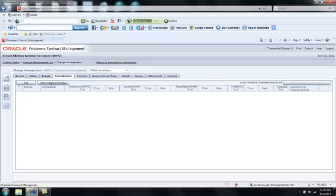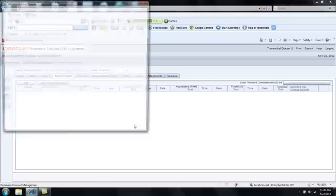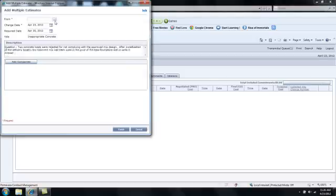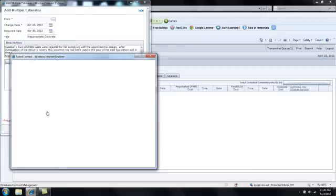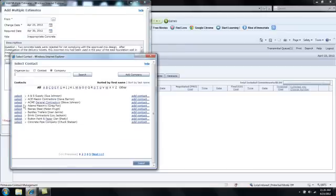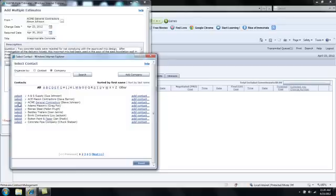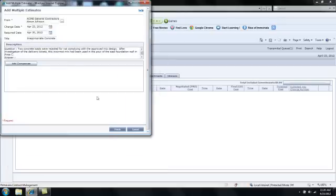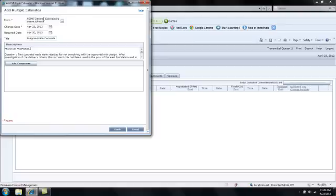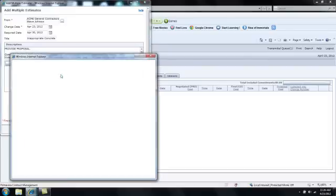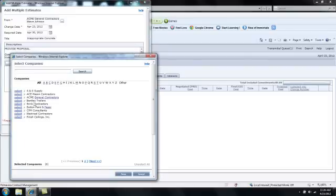I'm going to click Add Multiple Estimates. I'll record who this request is from. In this instance, I'll select Steve Johnson from ACME General Contractors. And in the Description box, I can request a quote or identify text or information that I would like to receive from the various folks that I'm going to select. I'll click Add Companies to select those companies from whom I would like to receive a quote. I'm going to select one company, Ace Mason.